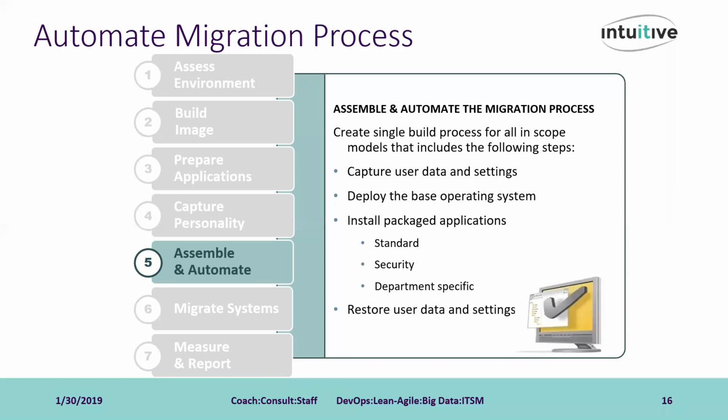One point also worth mentioning here is the phased approach, which should be followed. Like any project, you'll want to pilot this out to the newly migrated machines in a pilot environment with a few prearranged users from each department, and work closely with them to fine-tune that final imaging job before you roll it out to the full migration. So again, here at the end of this project phase, your image is assembled, automated, ready to be tested, and that complete imaging job is ready for migration.